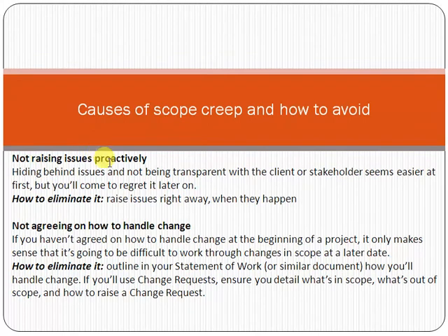That means, friend, if there are any issues coming, for example, you need some data from the customer. For example, you have a dependency on the availability of data, and you have to raise it at least 1 month or 2 weeks prior to the customer that you need that particular data. So if you are not raising issues proactively, it will become another reason for scope creep.